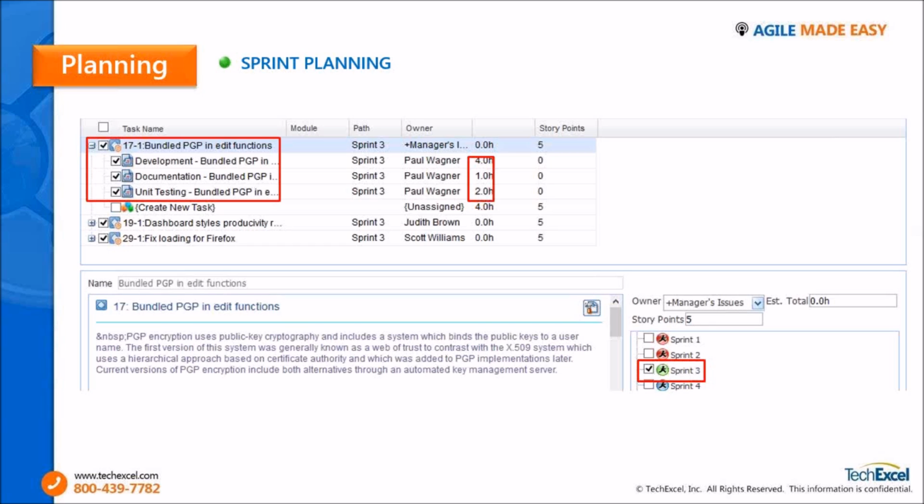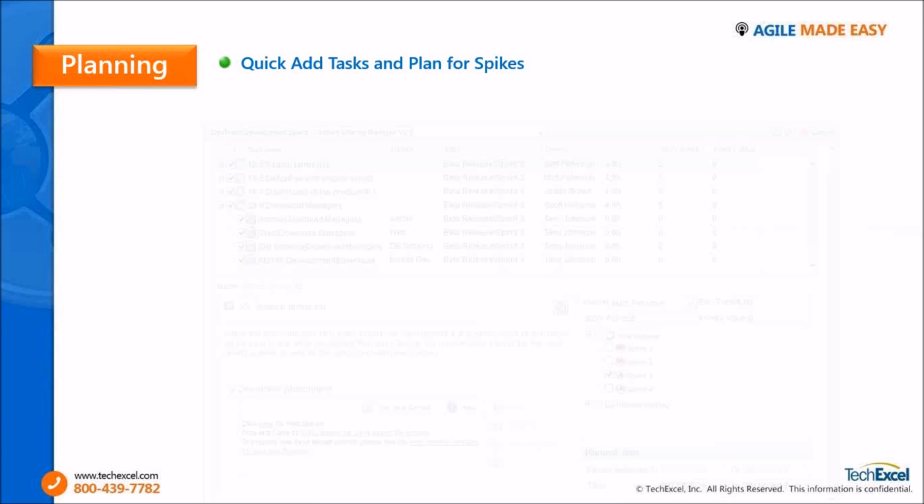But with 3 weeks, the number of sprints in a specific release got reduced, and because of that the sprints were being over-allocated. It was not very efficient because of the over-allocation, and it just took longer.